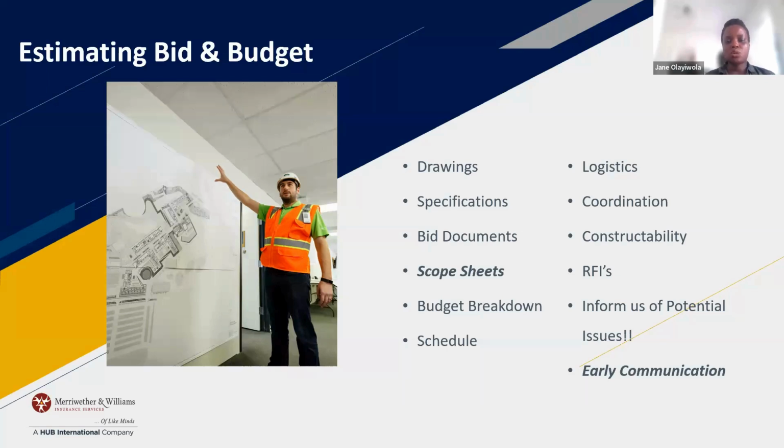All right. So you also want to look at constructability. Have they provided you something that is impossible to build? If they have, let them know right away. Submit an RFI. When in doubt, submit an RFI. It just makes the process better, because first of all, whoever you're sending the RFI to knows that you're invested, that you're taking the time to look over this, that you're offering your expertise or your suggestions, right? And then also, if there are ambiguities, you want to minimize those, right?